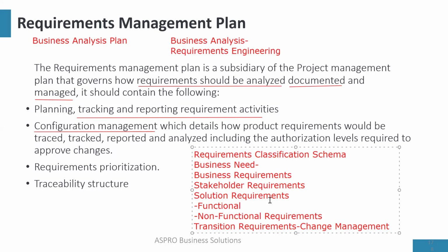Now, the reason I'm saying this is because of traceability. Now, what's traceability? Do you know that the business need generates business requirements? Business requirements generate stakeholder requirements. Stakeholder requirements generate solution requirements. Solution requirements generate both functional and non-functional, and eventually transition requirements.